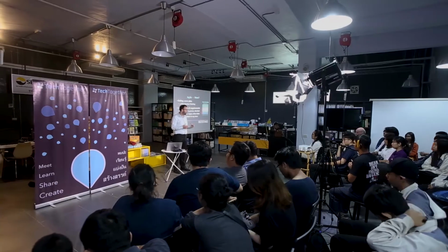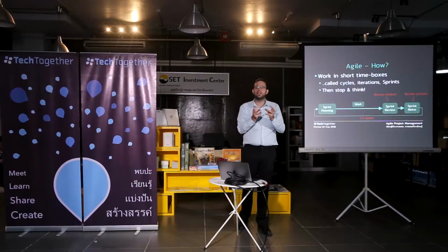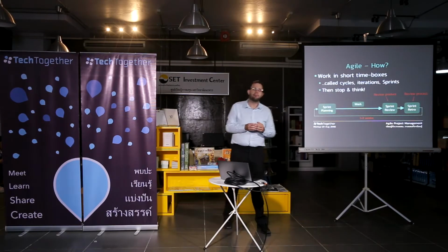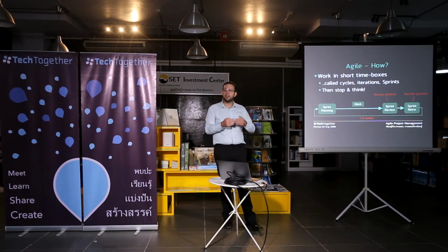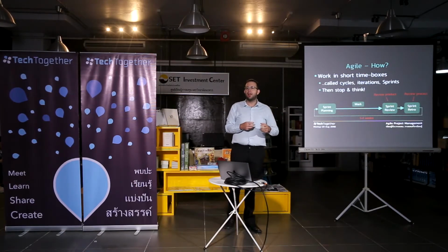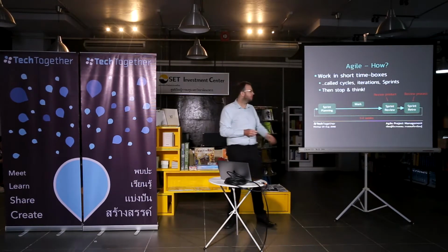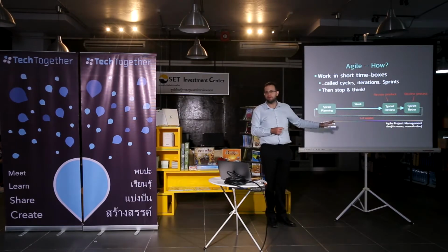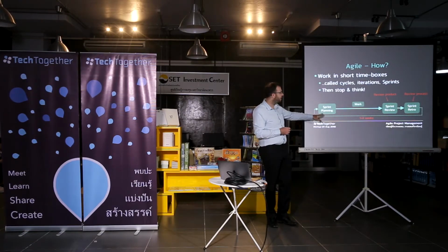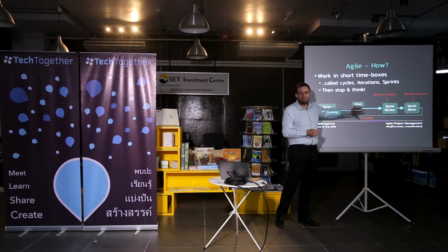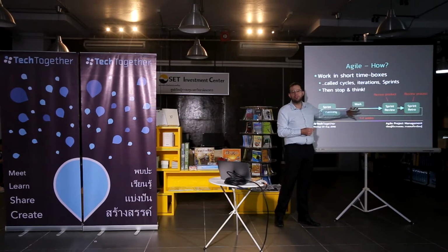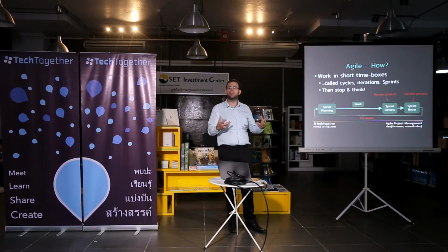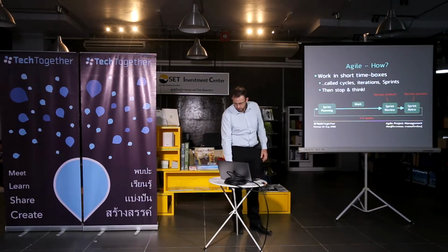If you're identifying this is the work for the next 2 weeks, typically you're more committed to finishing that work. And you start to get a better understanding how much work you can do, how much work is left, that kind of thing. So this is one of the main ideas in Scrum. This cycle is actually Scrum, not Agile. And I have skipped something on here, which is the daily Scrum, which is a daily meeting. So that's a big part of Scrum. It's called the rituals of Scrum, so the meetings of Scrum.